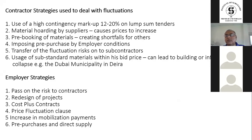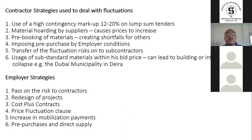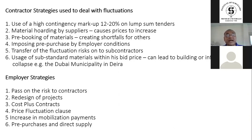The contractor strategies used to deal with fluctuations include the use of a high-contingency markup — 12% to 20% on lump-sum tenders. Materials hoarding by suppliers causes prices to increase. Pre-booking of material creates shortfall for others. Imposing pre-purchase by employer conditions. Transfer of the fluctuation risk onto subcontractors. And the usage of substandard materials within the contractor's bid price can lead to building or infrastructure collapse — as happened at the Dubai municipality in Deira, a massive catastrophic collapse of a building.